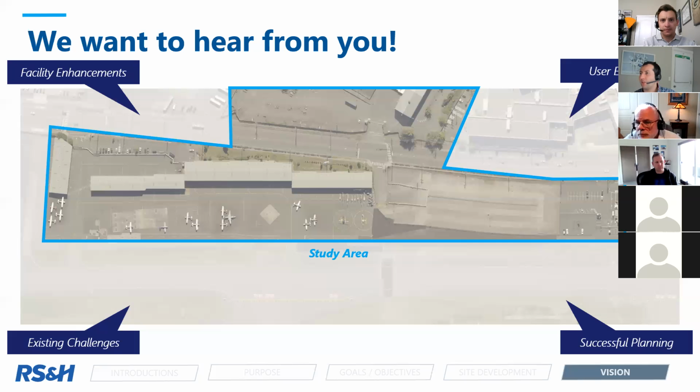What is the environmental impact analysis like for parcel planning? So what we'll do is we'll go through, and Steven might have a better answer for this, but from my experience, we would come up with our preferred alternative, and then if we get it put in the budget and start a design, that's when we would start the environmental phase, if not slightly sooner. And we'd be working with the FAA on that. There are different levels of environmental review: a categorical exclusion, an environmental assessment, or an environmental impact study. Depending on what you would be planning for that parcel, it would depend on what level of environmental review you would need from the NEPA side, which is the national level. And then of course we have the state requirements on the SEPA side. So that's about when that environmental planning would start. And they look at all kinds of things. Steven, you can probably give a better list, but it's air quality, noise, emissions, that kind of thing.